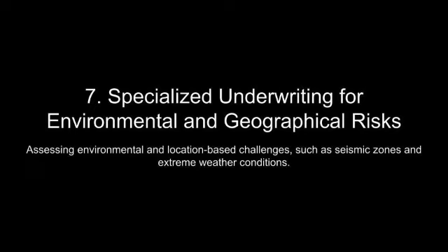for stakeholders. At the state level, Little Miller Acts extend similar requirements to state-funded projects, though specific provisions vary significantly by jurisdiction. For example, some states impose different thresholds for mandatory bonding, such as $100,000 or $500,000, and others have additional requirements for sub-bonds at lower contract tiers.